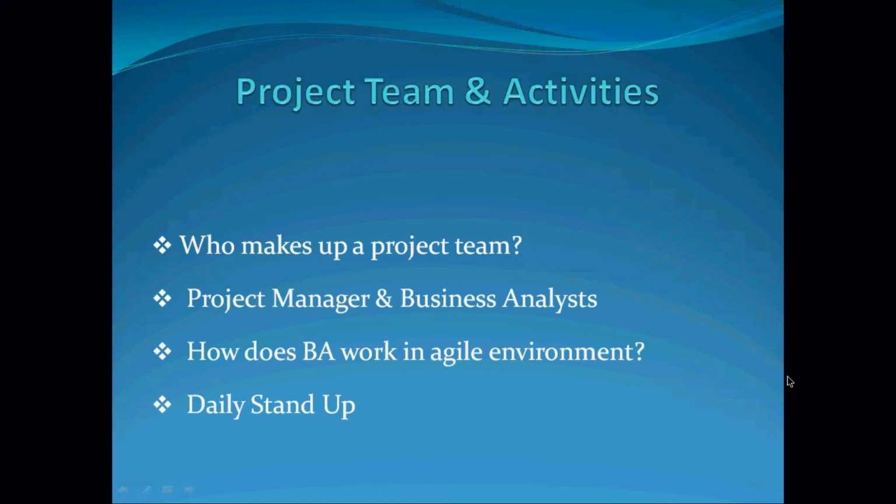So probably maybe I've got 10, and the next one they can only commit to 4 features. So while I've submitted that, I will start documenting my requirements for the next 4 features. I do the same process: write the user stories up, review it, get the sign-off from the stakeholders and send it to them. So they may say, okay, these particular 4 features are going to be the March release, next year. Then like that, you just keep working. It's more or less like working in phases.